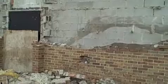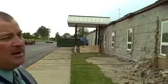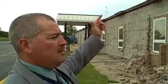Right. Now, provided all goes well, relatively speaking, you were saying within 5 weeks of today's date, Tuesday, June 21st, you're hoping to meet, what deadline was that again? Well, we hope to have all of this project wrapped up within 5 weeks of today, which includes the roof. We are putting a new roof membrane on. We're taking off a ballasted roof. We're replacing all of the windows along the A section, and we have an area of brick that we still have to do on the south side nearest to the gym entrance. Okay. And along the outside corridor that goes into the main student entrance.